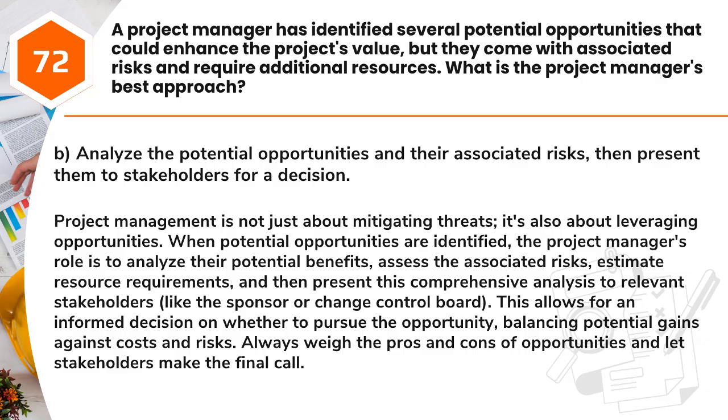resource requirements, and then present this comprehensive analysis to relevant stakeholders, like the sponsor or change control board. This allows for an informed decision on whether to pursue the opportunity, balancing potential gains against costs and risks. Always weigh the pros and cons of opportunities and let stakeholders make the final call.